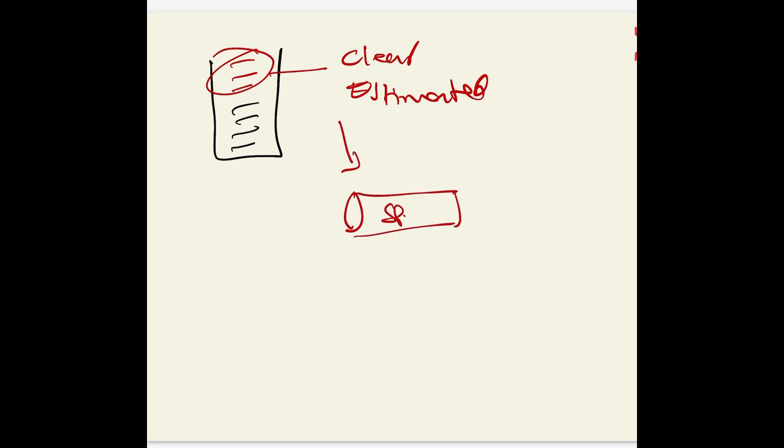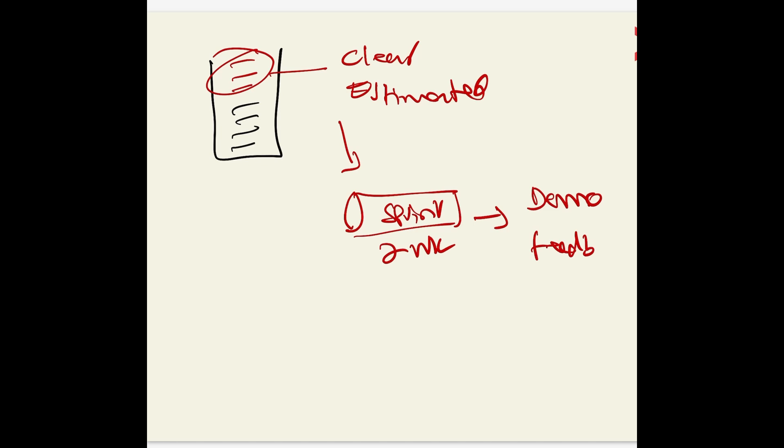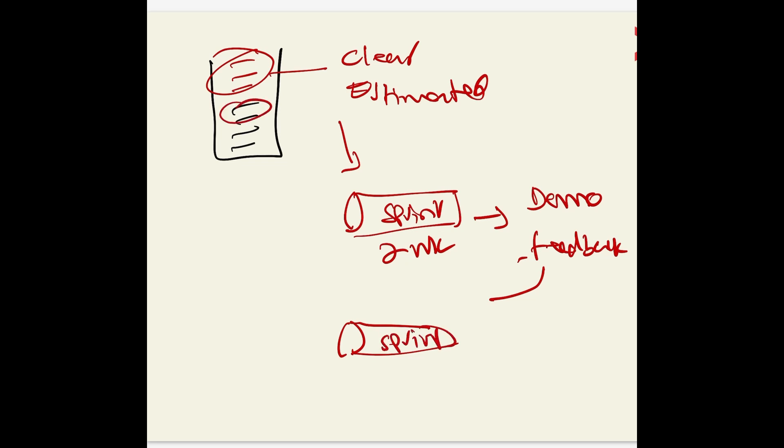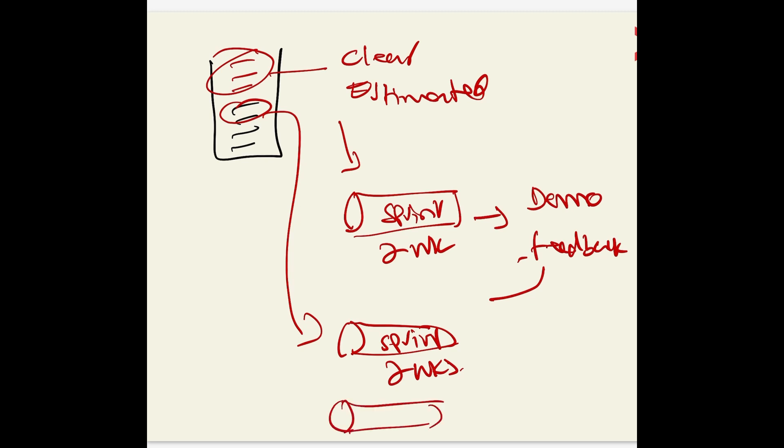You get your first sprint ready, and these are two-week sprints. At the end of the sprint you need to do the demo and get feedback, then take all that into the next sprint, take the next stories from the backlog, and again this is two weeks. You continue doing this until you've done more than one sprint.